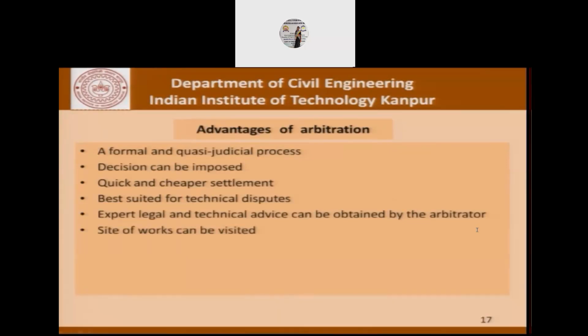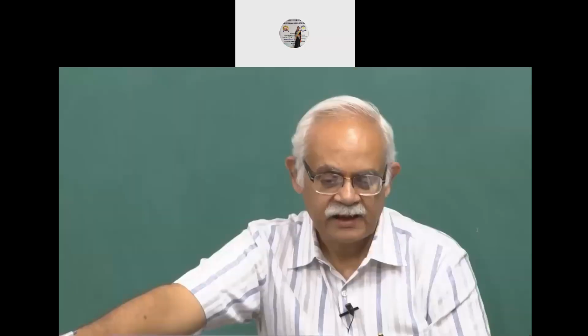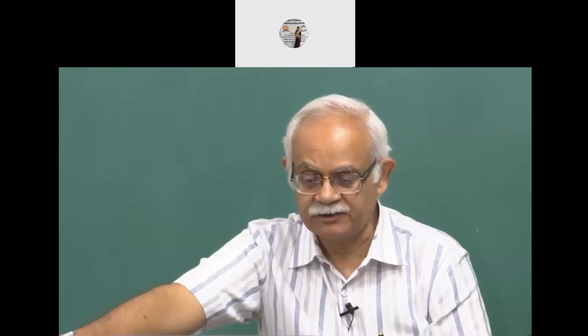The site of work can be visited. Interim relief can be granted, and the time and place of hearing can be fixed for convenience. There is a lot of flexibility here which is not available in court, and that's the advantage of arbitration.